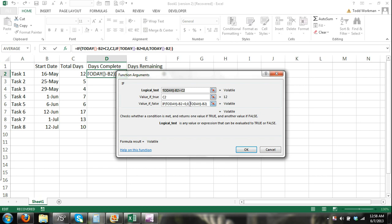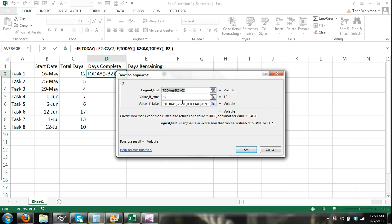Here you can see our value if false is going to be today minus the start date. The nested if function shown in the formula bar, the logical test takes care of any values that are greater than the total number of days each task is going to be completed by giving it a result of total days, and the nested if function for the value of false argument takes care of any values that are less than zero in the case of the task that the start date has not arrived yet.